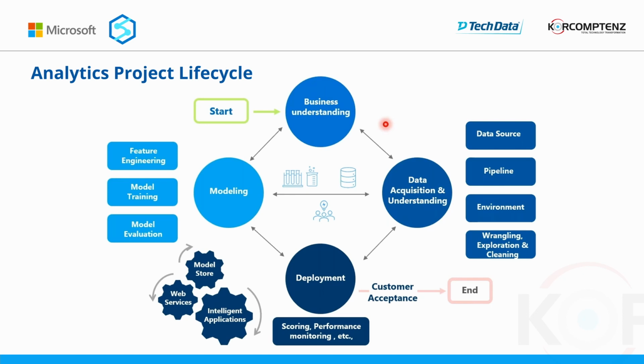As a next step, we investigate the existing data assets and pick the relevant inputs required for our purposes. If we find them inadequate, then we work on getting additional data from other apps internally or even from external sources if required. At the end of this phase, we deliver the project charter with clear and measurable objectives, pick the required data sources, and determine the variables and put them in a data dictionary document.